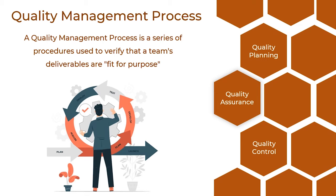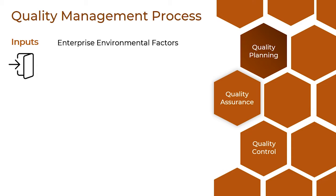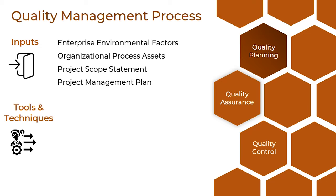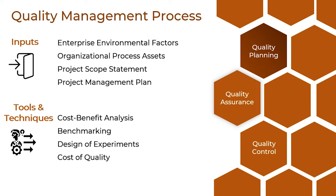Quality planning is the first phase. The inputs included are enterprise environmental factors, which relate to conditions that influence, constrain, or steer the project, program, or portfolio that are not under the immediate control of the team. Then organizational process assets is our next input. PMBOK defines this as the plans, processes, policies, procedures, and knowledge bases specific to and used by the performing organization. Next, the project scope statement comprises a full explanation of the work that must be completed to provide a project's output on time and within the budget. We also have the project management plan. The tools and techniques include cost-benefit analysis, benchmarking, cost-to-quality, and many other additional tools.